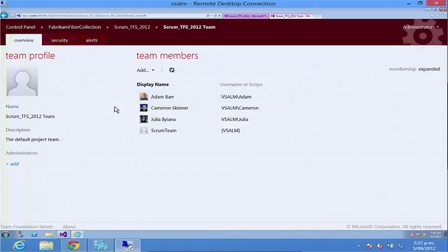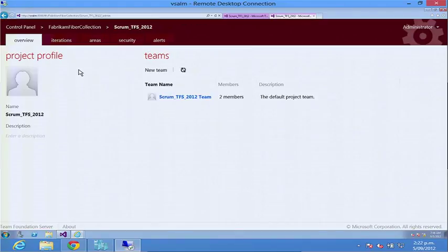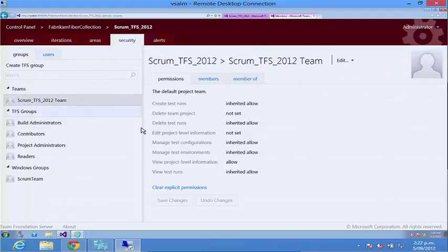So then what security have they now got? You know the traditional model in Team Foundation Server, we have project administrators, contributors, readers. We can have a look at how they're secured through here. So I'm going to go to my team project level and security. You can see I've got this new notion, right? This teams element here. I've got my traditional groups there, contributors, administrators, and readers. So project administrators, do everything, and still the only people who can change iterations.